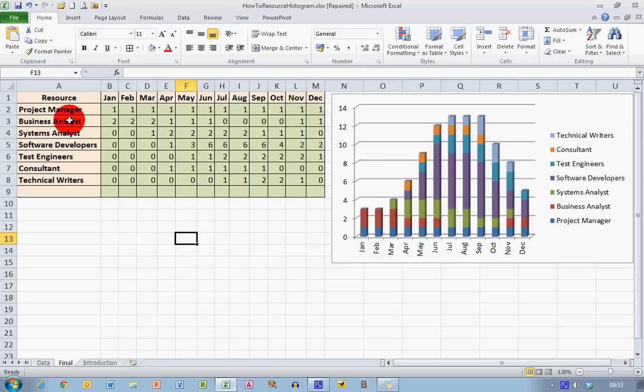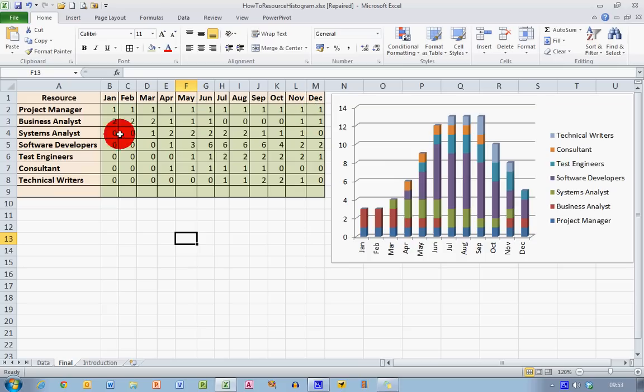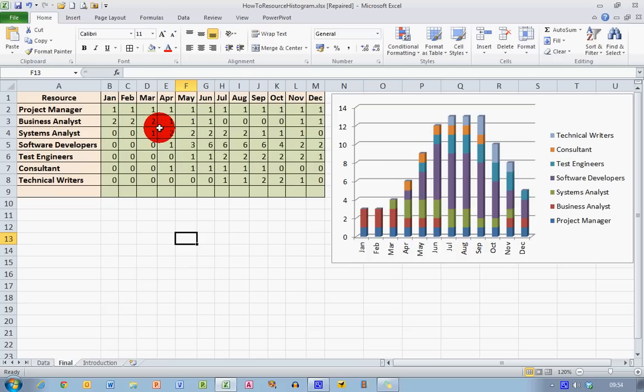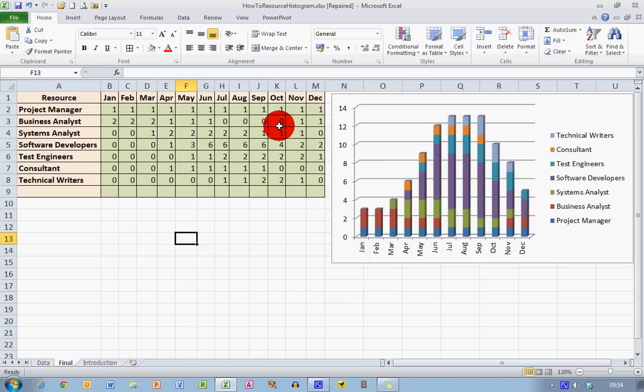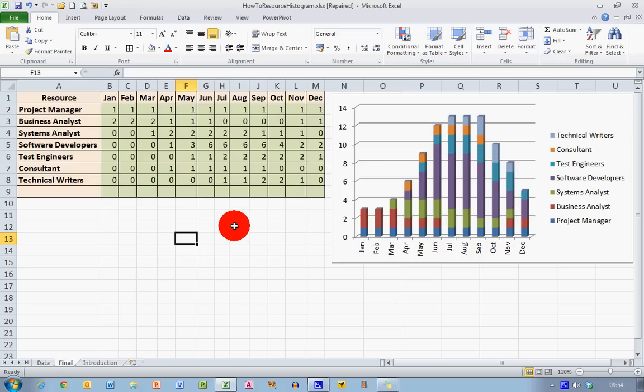We can see from my table that a project manager is required for every month throughout the project but that another resource, Business Analyst, we require two in January, two in February, two in March and then one for each of the next three months and then none for the next four months or so. And we can see if we follow down and read through the table that we require different numbers of people at different times throughout the project. And a resource histogram is a good way to graphically illustrate these data here.